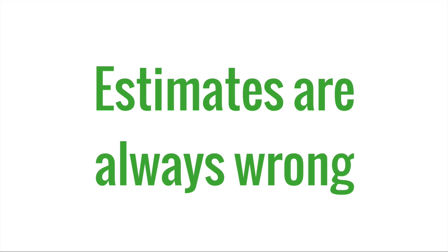Okay, a couple more quick points to wrap this up. Estimates are always wrong. The corollary of that, to my mind, is don't spend a lot of time on them. A person with a reasonable knowledge of the tool and a reasonable knowledge of the domain is not going to improve substantially on their gut instinct as to the complexity level of a problem. That's one reason why points are kind of coarse. We don't really talk about decimals. We usually talk about like 1, 2, 3, 4, 5, in part to encourage just quick, coarse estimates.